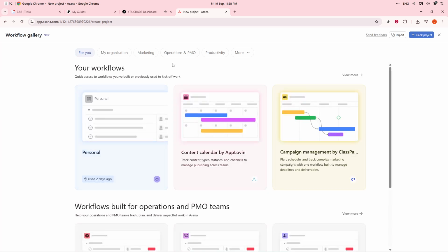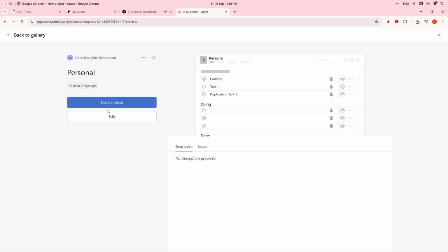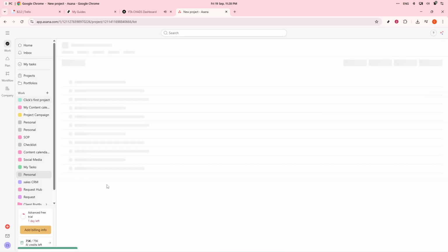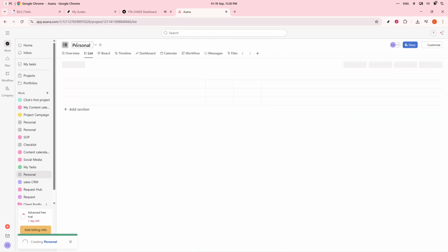The first step is creating the structure of your Scrum workflow within the board view. Set up sections which will help manage the different stages of your tasks. These include product backlog, where all your ideas, tasks, and features waiting to be prioritized are displayed. This acts as a repository for everything that needs attention.